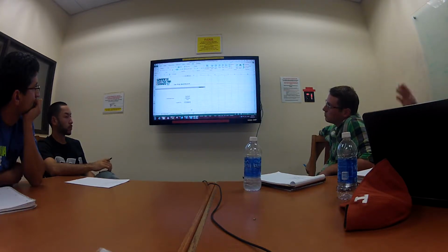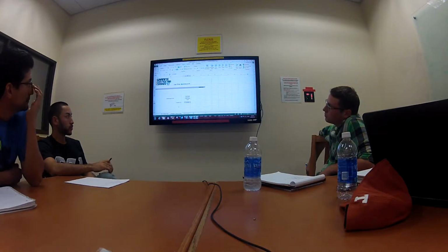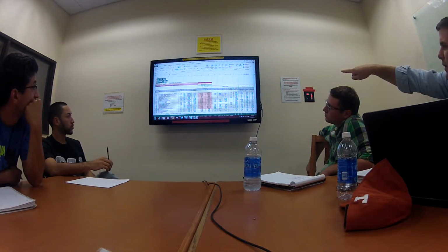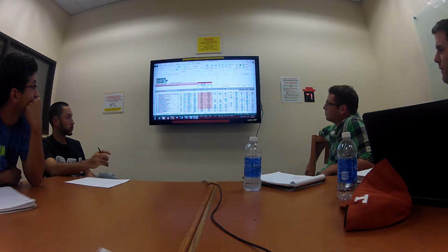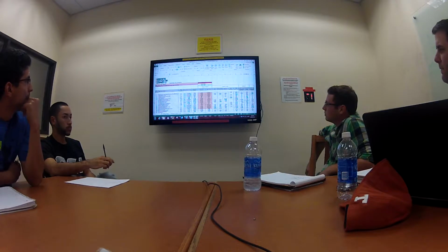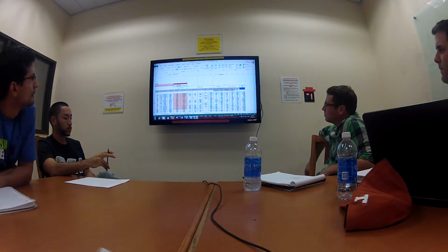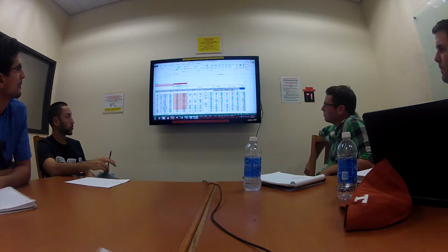Okay. I believe I spread evenly. Scroll, go to the bid closing sheet, 41.68. Yeah, so I spread that evenly for indirects. Indirects are spread evenly across each direct cost dollar. Can you put the direct costs in the analysis?